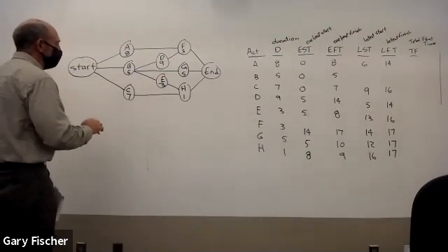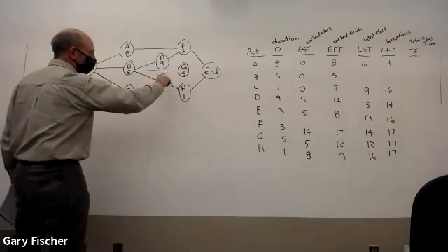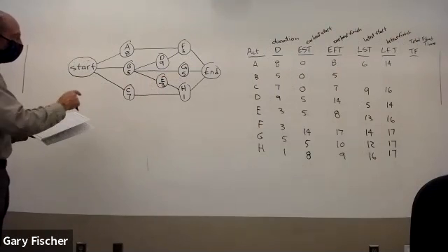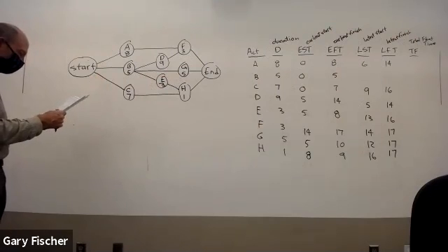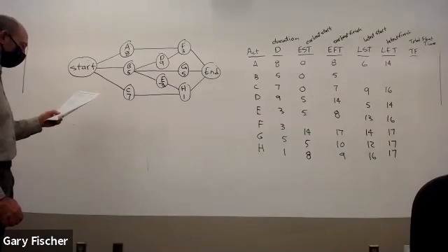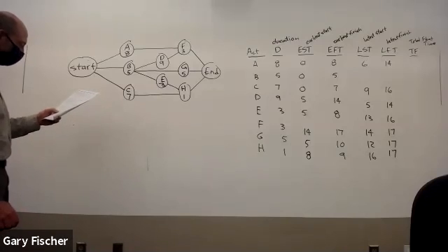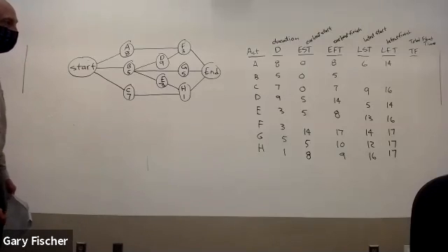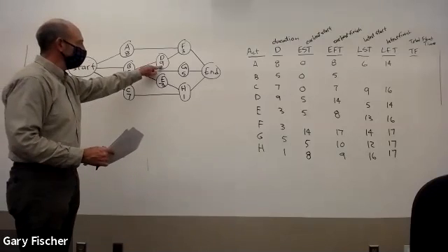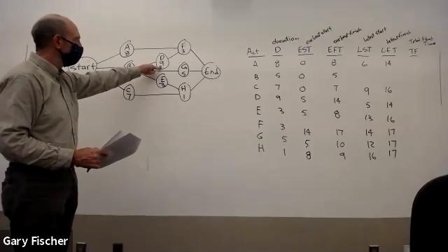And with B, it's followed by all of these activities. Let's see how they do B. It is followed by G, and it has to go through all these different kinds of paths. It says for B, the latest finish time is 5. How do we calculate that? The latest start time is D, which is right here. 9 plus 3 is 12, 17 minus 12 is